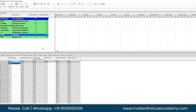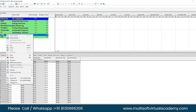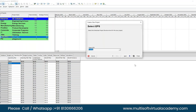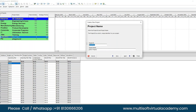Select Training — we will add the project there. Right-click on it. Can you see the Add option? Click Add. The EPS is already selected, so click Next. Now same as yesterday: enter the Project ID — DRN1000 — and Project Name: 'Project Creation'. Click Next.